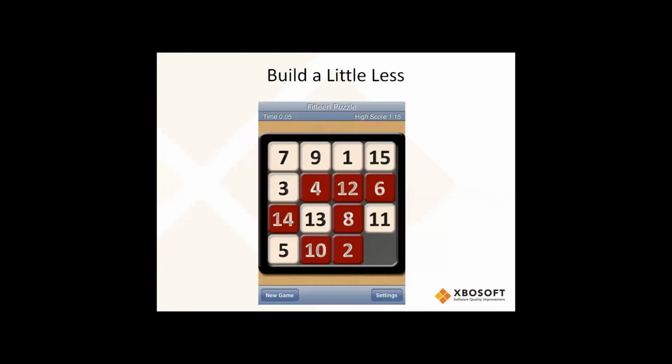And when we talk about backlogs that a team has to build within the deadline, very often they've filled that last square and you can't move. So the idea of thinking about the size of your backlog and just dialing it back a little bit and leaving an open square allows the team to have enough latitude to move things around. So that's a key thing that I'm going to recommend to you.